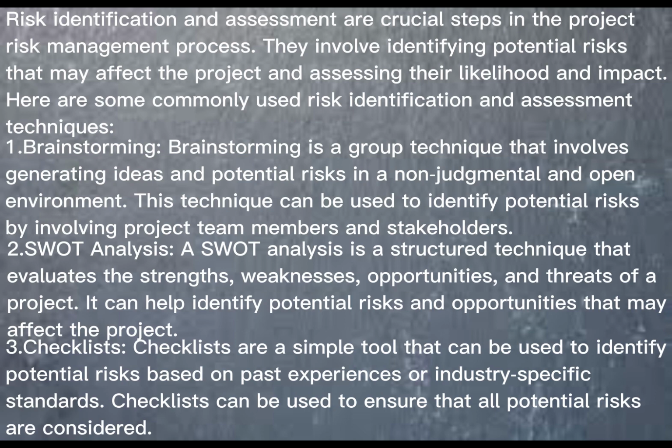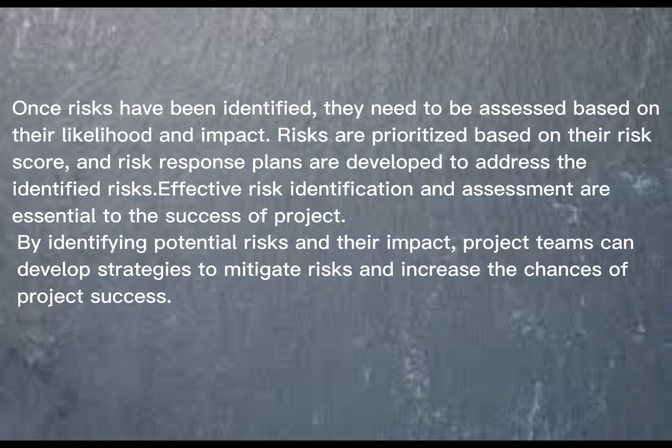3. Checklists. Checklists are a simple tool that can be used to identify potential risks based on past experiences or industry-specific standards. Checklists can be used to ensure that all potential risks are considered. Once risks have been identified, they need to be assessed based on their likelihood and impact. Risks are prioritized based on their risk score, and risk response plans are developed to address the identified risks.